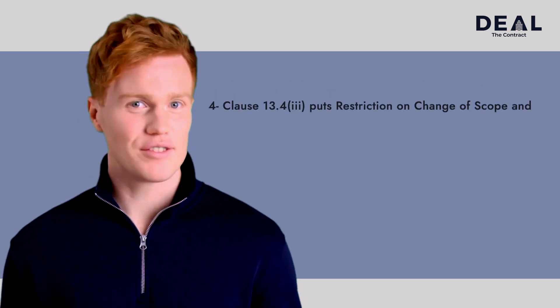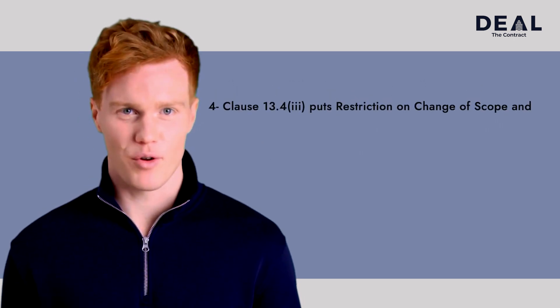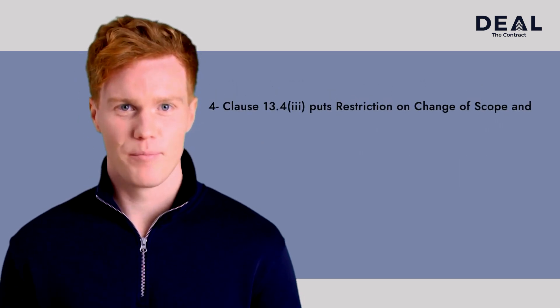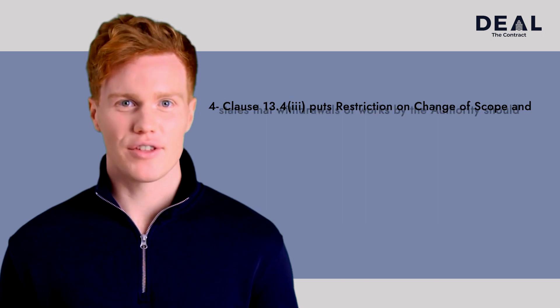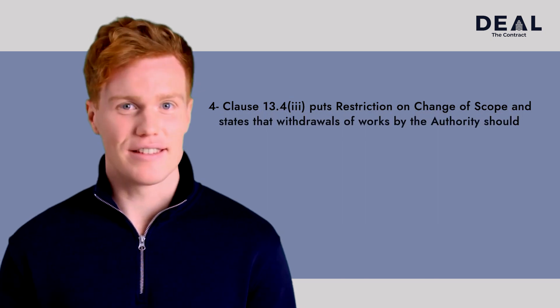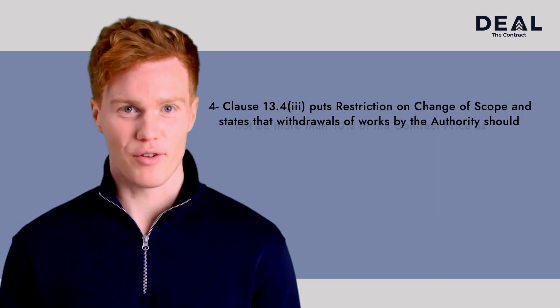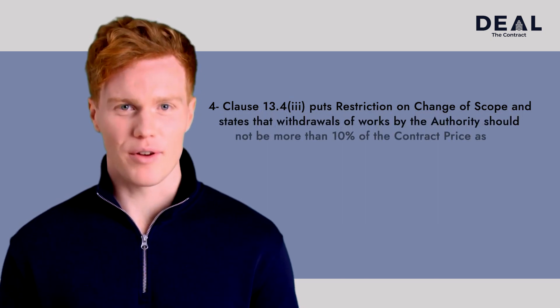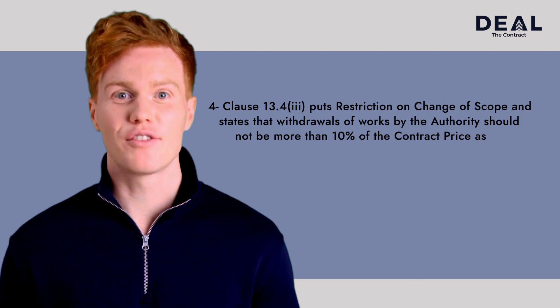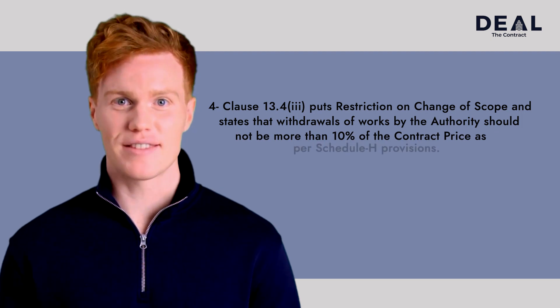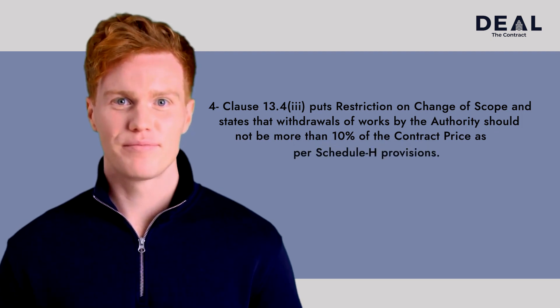Fourth, Clause 13.4.3 puts a restriction on change of scope and states that withdrawal of works by the authority should not be more than 10% of the contract price as per Schedule H provisions.